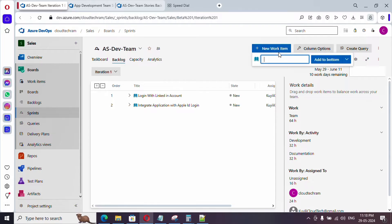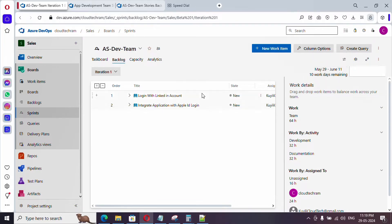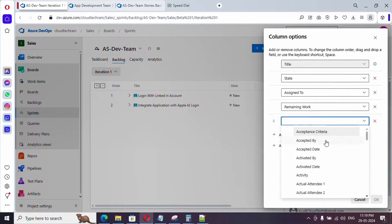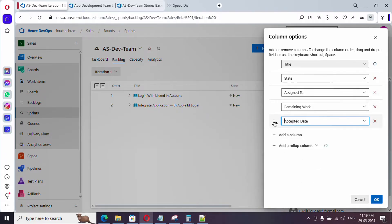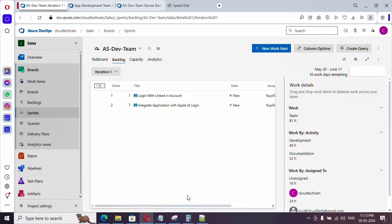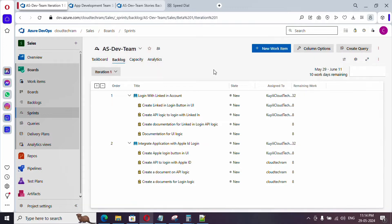To create a new work item use the option provided. To add a user story to the bottom of the backlog use that option, or define it at the top. To see additional columns, use the add column option — just type the column name and drag and drop to reorder. In the dropdown it shows the current sprint iteration based on the current date. You can also switch to any future or past iteration from here. Click 'expand one level' to list out the tasks.